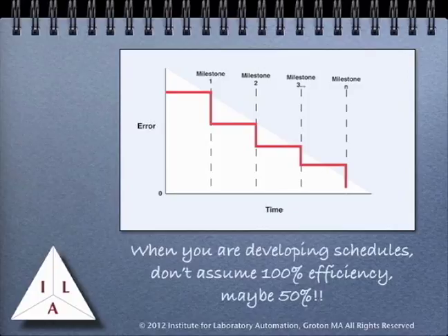I'm aware of one case where a request was made for a time estimate to carry out a piece of software development. And as noted, the person who received the estimate doubled it. And the person they gave it to doubled it, to the point where the cost of the project was well beyond reason and wasn't funded. Make sure the people you're giving estimates to understand how you arrived at those estimates and don't inflate them just to protect themselves. If you are doing something you haven't done before, making a time estimate is very difficult.